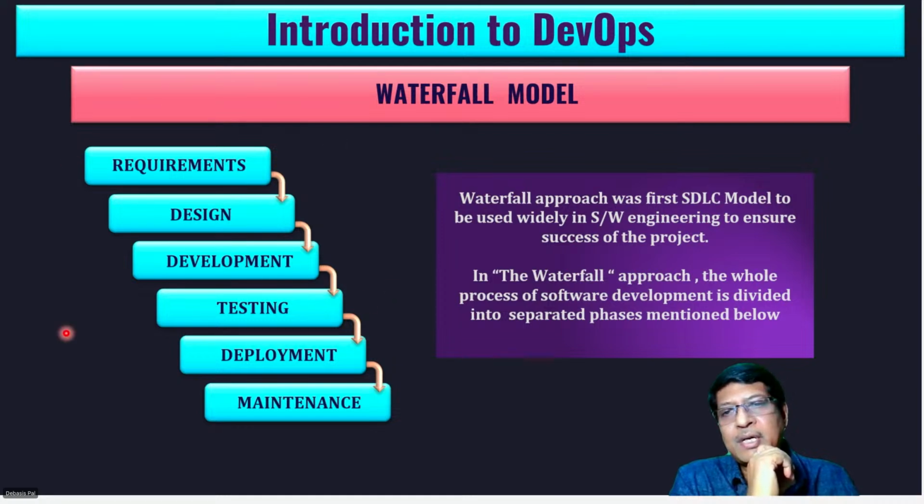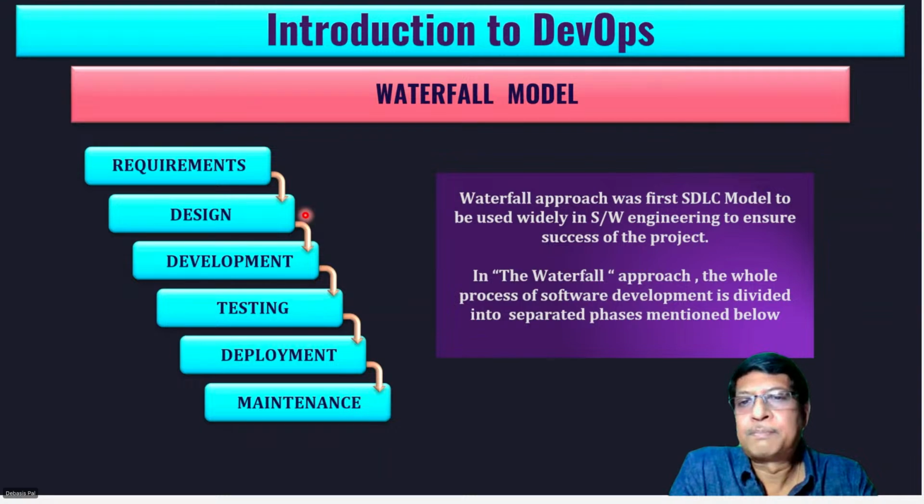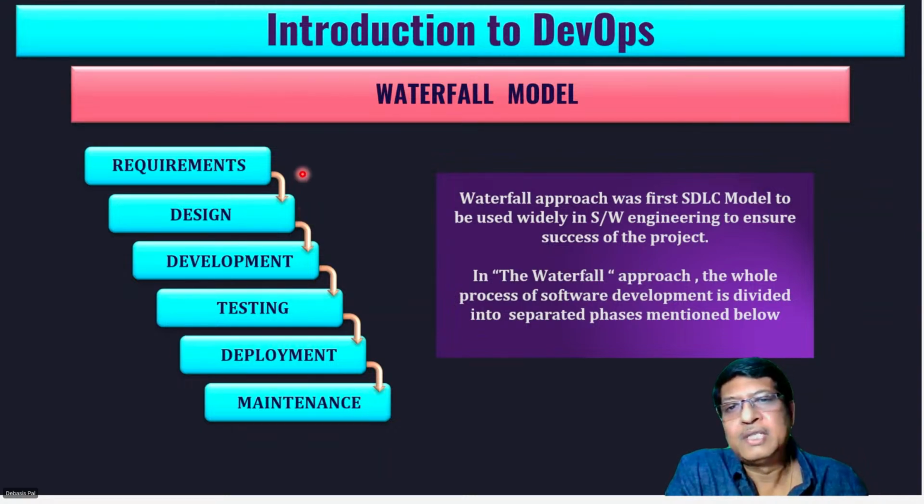Isn't it a hidden theme by seeing this model? What do you think? What I'm saying is, by seeing this, I have a feeling that the project manager of this project is a very confident guy. He has not made any provision such that it can go back. There is no failure at the beginning. So what happens if there is some failure at this stage? You have no other way but to go back right from the beginning.